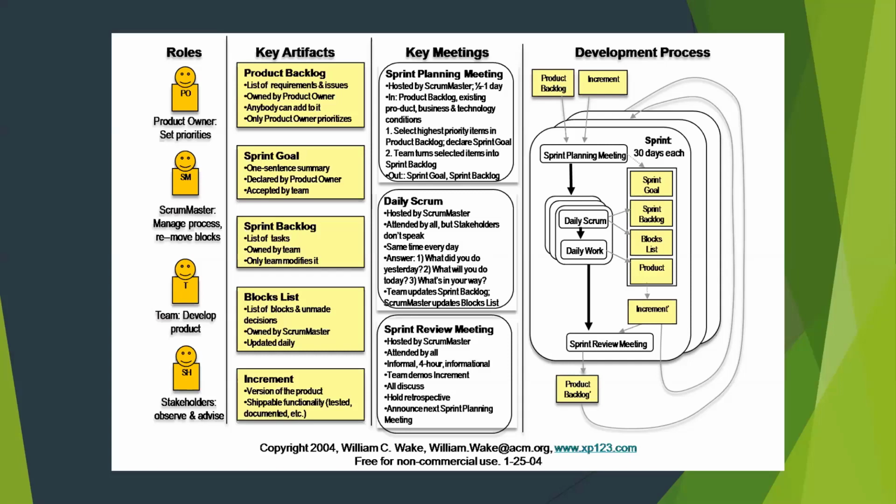But it is important that the Scrum Master and or project manager make sure that those daily meetings are no longer than 15, 20 minutes tops, and that the team members are staying focused on what was done yesterday, what was accomplished, what you're going to work on today, and what the roadblocks are. And it's up to the Scrum Master and the project manager to make sure that any roadblocks that are identified are taken care of and removed, basically.